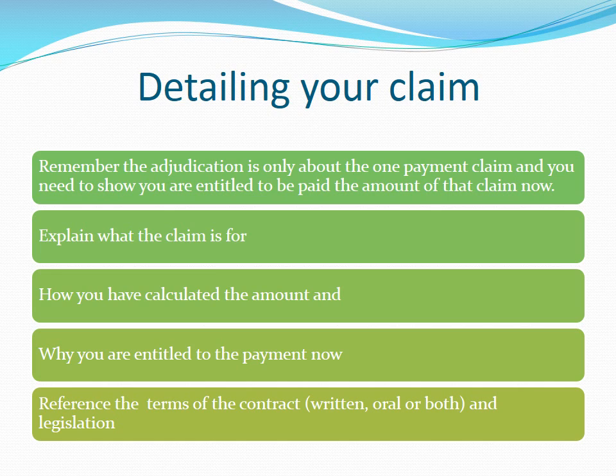Detailing your claim. This is what you are asking for, so make sure you explain what you want, how you have calculated it, and why you are entitled to it. Even where there is no payment schedule or the respondent is only disputing one or two items of a claim, you still need to show the adjudicator you are entitled to the entire amount claimed. This is where the payment claim table you developed to write your payment claim can be used. It is acceptable to insert the information in a table format.